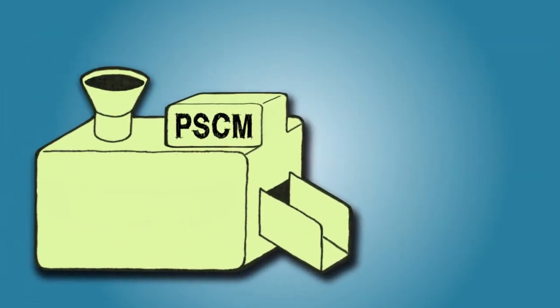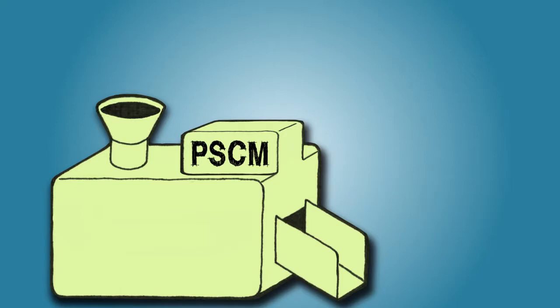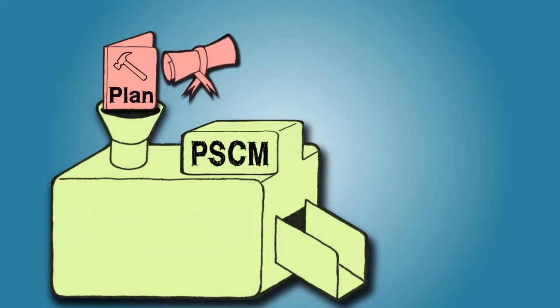The first input into the planned schedule management process is the project management plan. The project management plan includes the three elements that make up the scope baseline. Remember, the scope baseline is created from the information from the project scope statement, the WBS, and the WBS dictionary. It also includes any other information about the risks that may affect the plan. The project charter provides a summary of the milestones in the project schedule and has the requirements that deal with any time constraints.